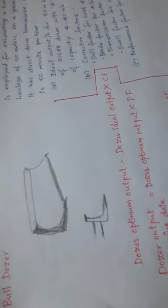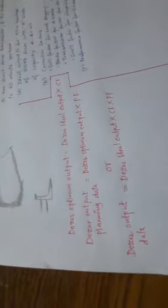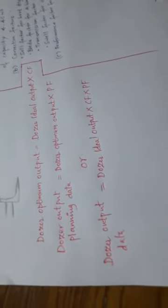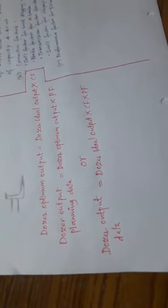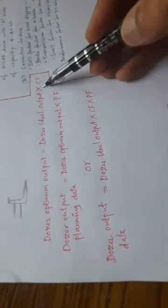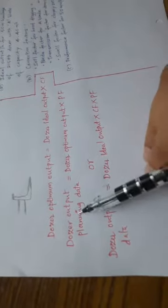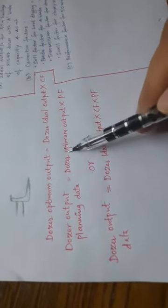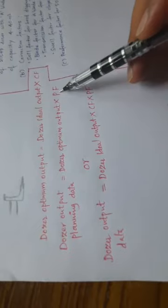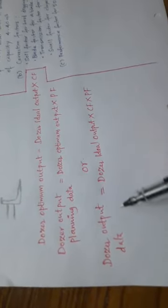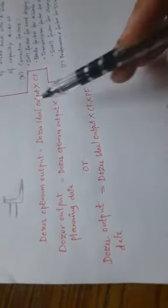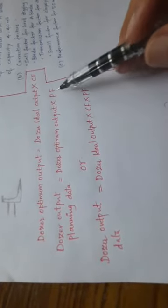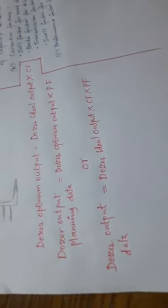This is how you're going to calculate the dozer output data. The dozer optimum output is dozer ideal output times correction factor. Dozer output for planning data is dozer optimum output times performance factor. Generally, you can write in one equation: dozer output equals dozer ideal output times correction factor times performance factor.